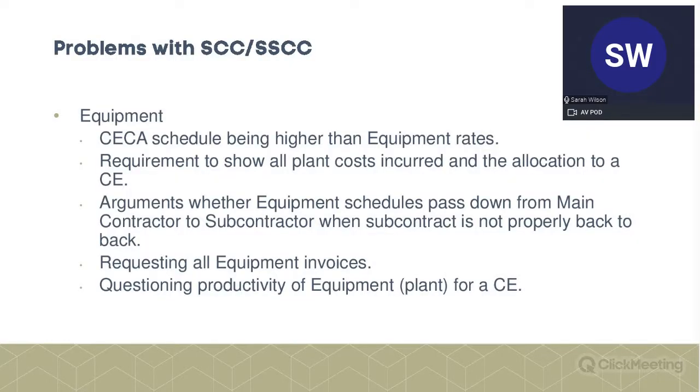As far as the equipment's concerned, sometimes clients don't like the Schedule of Cost Components rates being used because they say they're higher than they would like. And again, similar costs to the people, probably less sensitivity, but there's the requirement to show we had this particular crane and this is the particular cost of that crane.